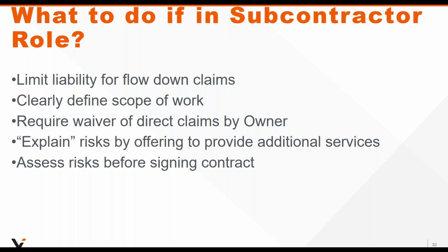For example, design builders will often bring in a mechanical sub to do both the design and construction of the HVAC system. And you need to be upfront about what your scope will be and clarify that these specialty subs will have sole responsibility for their design solution. That often means also requiring that they carry the necessary insurance.